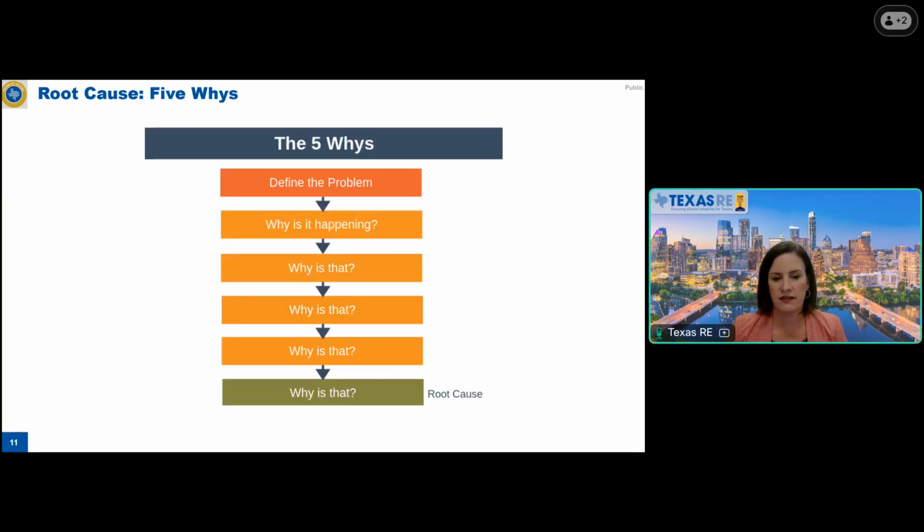Now let's talk about the next thing you're going to have to select in a line, and that's root cause. The root cause we like to think of as an exercise in the 5 whys. Originally, you think of the thing that happened and you think of a first idea of what the root cause was. And often that idea is something like, someone made a mistake. Well, that is a cause, but is that the root cause? Ask yourself why. Why is that happening? Why did someone make a mistake?